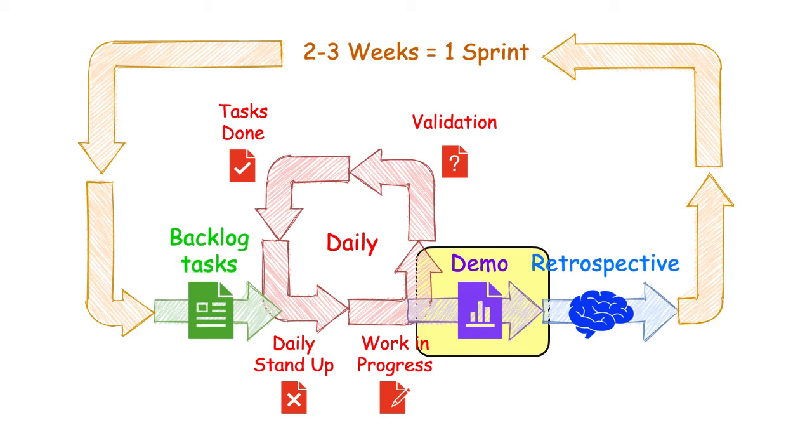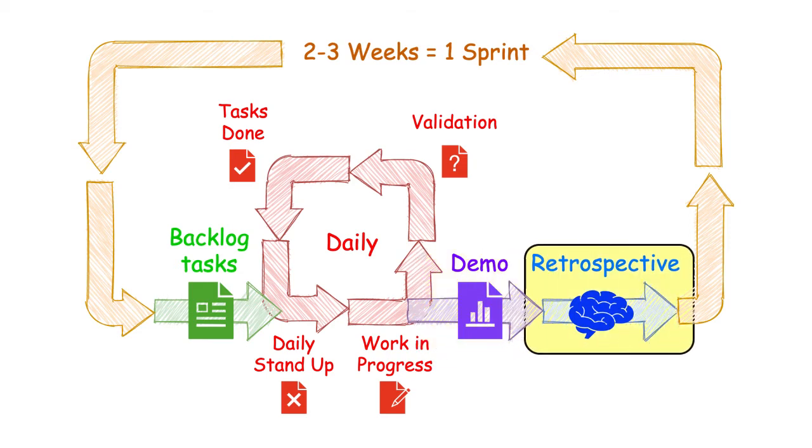After that demonstration product, which could be again an exam or a paper, something like that, we go on to the next step, which is called the retrospective. This is a chance for everyone to take some time to pause and consider, and it is useful to actually explicitly write this down, each student. And the questions you might want to ask are, what worked during this sprint, what didn't, what changes would I make for the next sprint?